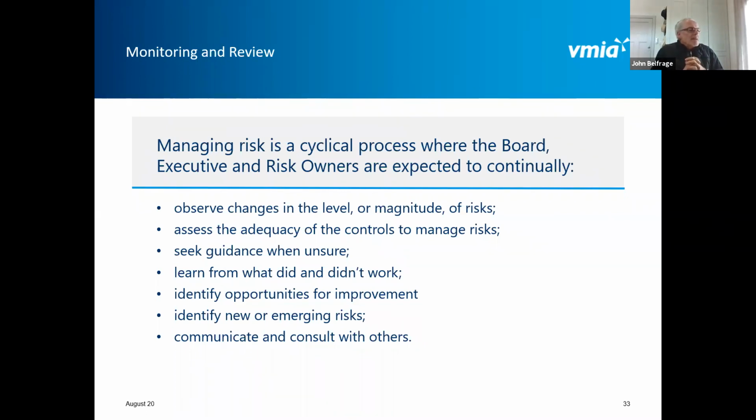So, risk information requires regular monitoring and review to ensure decisions are based on the best available information. The usual method of presenting risk information is in a risk report, and you can use some of the dot points in the slide above as headings in such a report. A copy of the extract from a risk register can also be attached, and this should be combined with a narrative.